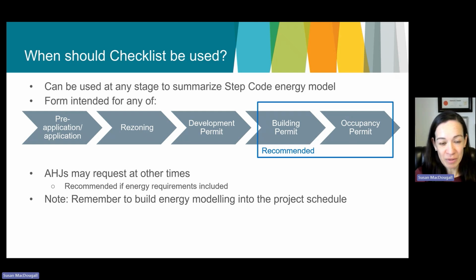For example, if a building permit were being submitted today and all consultants were completing their drawings today, the energy model would need a little bit more time to catch up and capture everything that was in those documents in order to submit it on time. So it's just a quick reminder that sometimes the model has a little bit of that delay because it's based on everyone else's work.